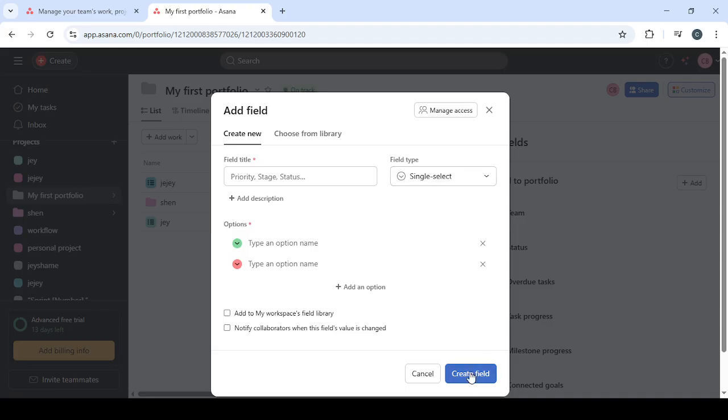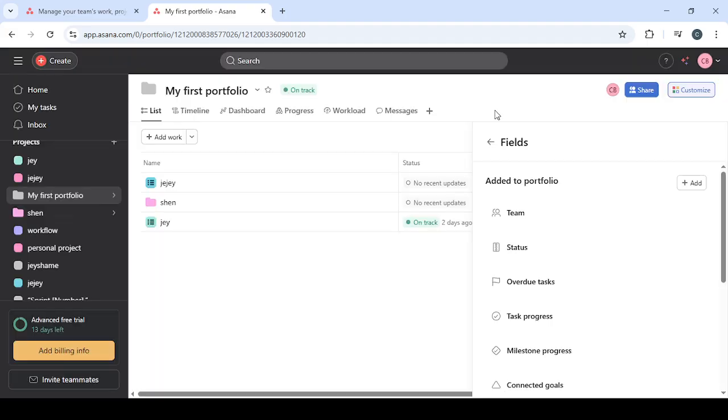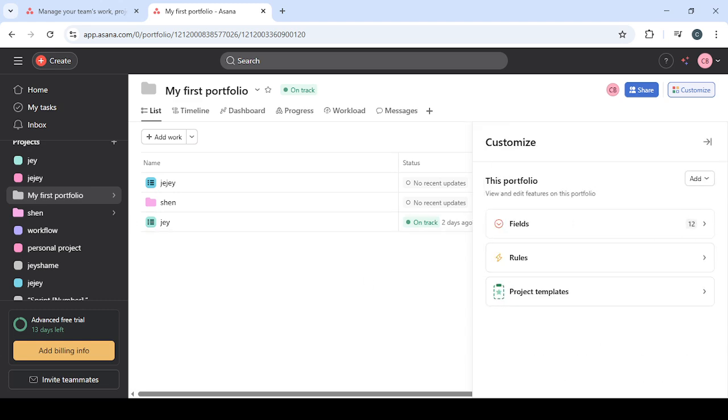If your tool supports custom fields, add the ones you consistently depend on, such as priority, complexity, channel, or component. Keep anything time-sensitive or person-specific out of the template so you don't have to undo it later. For example, avoid setting due dates and leave assignees blank unless they never change.